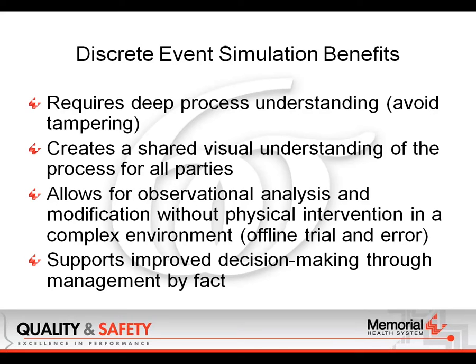But I wonder if you could say how long it took you, how much time you had to invest in doing that. To do a simulation, it took me about 60 hours for each of these of actual building the simulation. When you build a simulation, you can plan on about a third of your time actually building it, and then two thirds of the time debugging it, because you want to get a real world simulation. So you want to make sure all the numbers are correct and that you've got all your distributions entered correctly. So with the OR, it was about 60 hours.